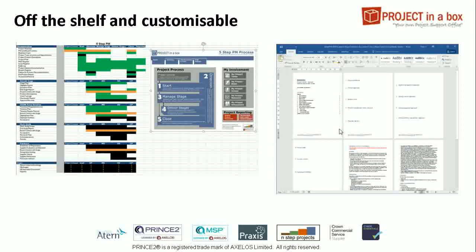You can put personalized templates into these methods if you want to, but there is a standard set of templates there. We've settled on the PRINCE2 templates because they're pretty well understood by most people, and in fact many organizations are using the full PRINCE2 method up at their big complex projects, so it makes sense to use some of the same templates down in their lighter, less complex projects. So that's a theoretical overview of n-step.